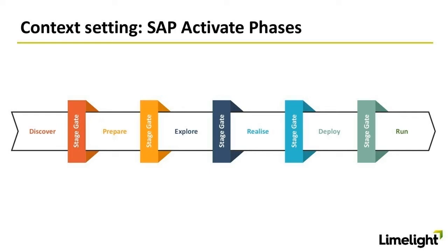Deploy, as it sounds, is the sharp end, or getting towards it. So that's where we start to get into the activities which really ramp up the engagement with the business. So you start to get into user acceptance testing, training, cutover, and from a data perspective, all of that wrapped into data migration and establishing the control and so on.